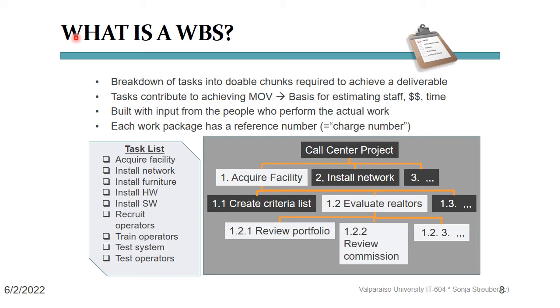So to get from product requirements to the work breakdown structure is not all that easy. If you're starting a new project from scratch, you will indeed have to assemble the team, that is, the people who do the actual work, and brainstorm with them the list you see here in brown. This is going to take a number of go-arounds.